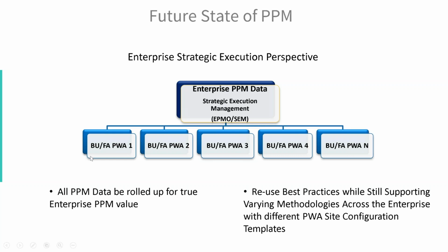So we can measure it if we actually have that roll up, that perspective of what's happening in our individual PWAs. So a business unit functional area is going to receive one, and a segment of that data will actually roll up into that enterprise PPM data repository, so we can report to executives what's happening with those major initiatives. So the concept is that all PPM data needs to be rolled up for true enterprise PPM value.